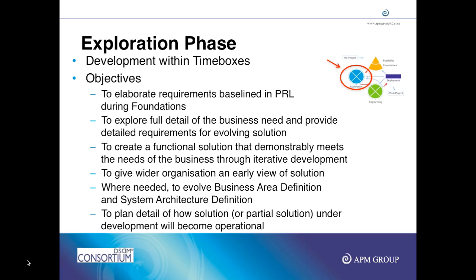We discussed pre-project, which is the time where we identify a business problem to be resolved. We identify the sponsor, we identify the visionary, and we define the business drivers for the project. We document them in the terms of reference. It might not be a physical document, it might be an email, it might be a discussion between the stakeholders.